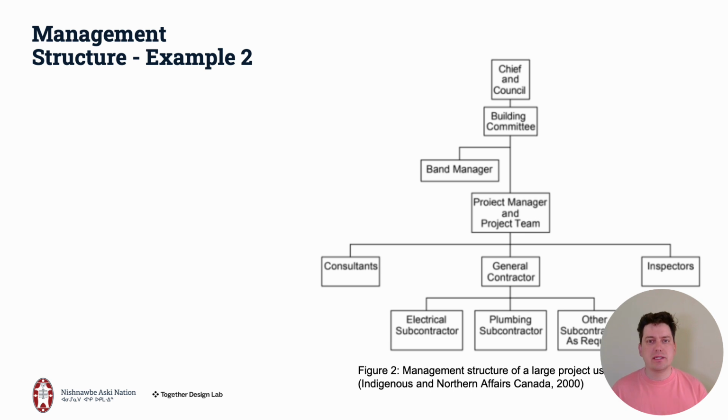And so the structure that we see on screen may be more fitting if you don't have as much experience or capacity managing the day-to-day of a construction site, and instead allowing the general contractor to do that. And so that often means, in this context, bringing in someone external to the First Nation to do that, or hiring a general contractor from within the First Nation. But it removes the construction responsibility from the project manager and allows them to play a bigger role in kind of oversight and administration.